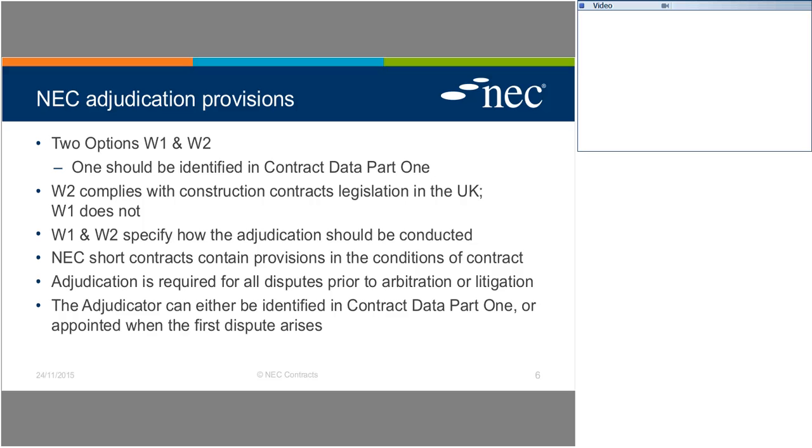Option W1 in NEC documents does not comply with that legislation, primarily because it restricts the time period that parties have to refer a dispute to adjudication, whereas one of the fundamental parts of the construction contracts legislation is that parties should be free to refer a dispute to an adjudicator at any time.